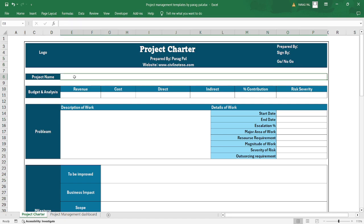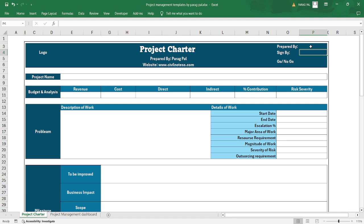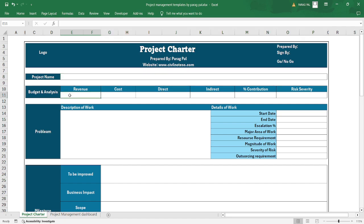The project charter should be prepared by the project manager, internal company managers, high-level directive managers, and PMO support. It needs to be signed by all these respective people, and specifically signed off by the internal sponsors.